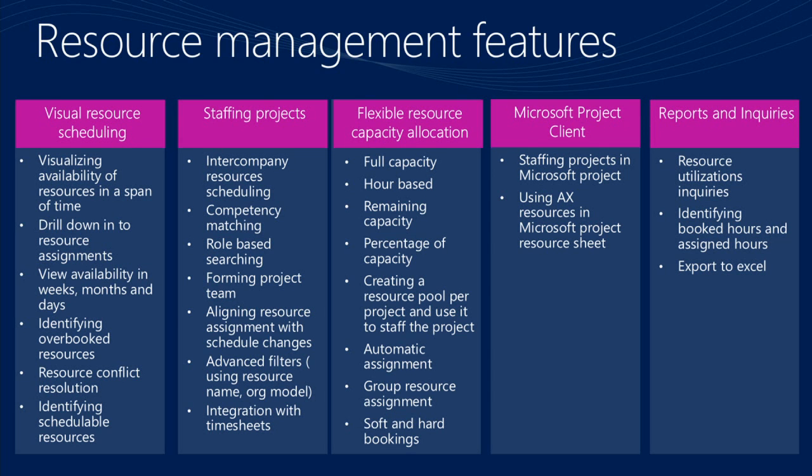Now we have added this new feature that you can, in the project management and accounting module, say, I want a new resource. Then you can browse the workers in HCM, choose the worker that you want, choose not only the calendar, but all other project management related stuff, like period codes that they want to report time against and all of that. You can specify that. So there is one complete view into your schedulable resources, human resources, and then setting parameters about that.